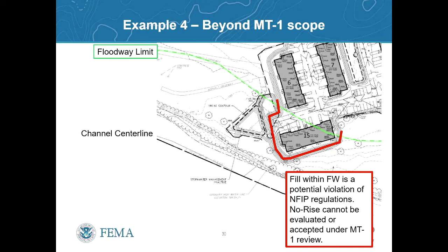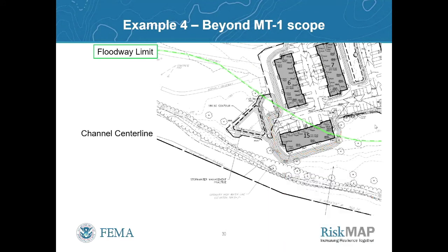If your project is proposing fill within a floodway, but is proposing it's not a violation because there's no BFE increase and no changes to the floodway boundary, that's got to be done through the MT2 process. We cannot evaluate those effects.